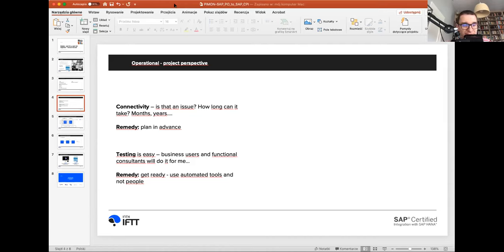We have this beautiful case that we have hundreds and thousands of really good messages that we can reuse for testing. For example, we have them on the production landscape, right? So what we can do is take the production messages from our PO system and run them through the CPI test system or development system and check whether they produce exactly the same messages after you changed the flow and did all of the development steps that we discussed in the previous slide.